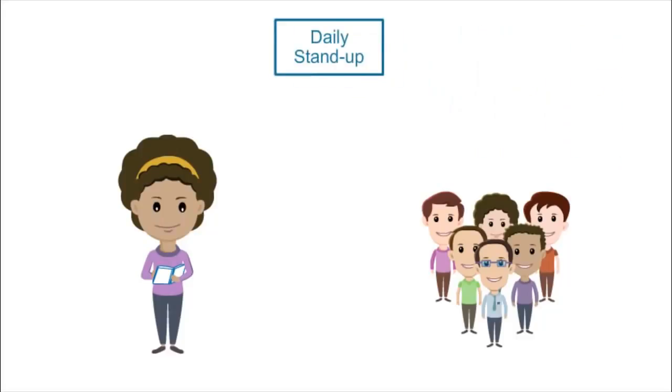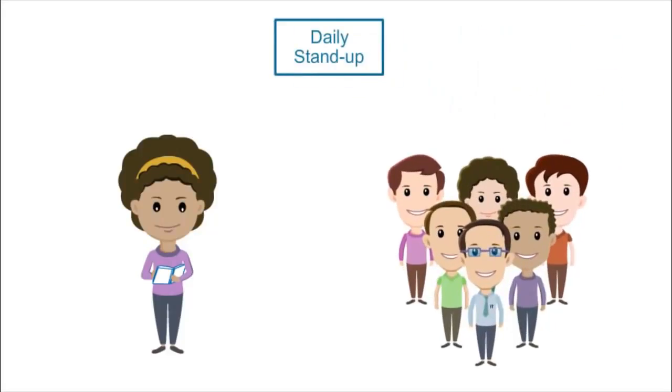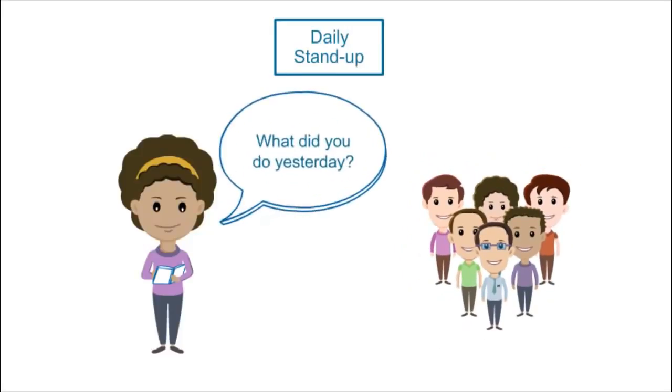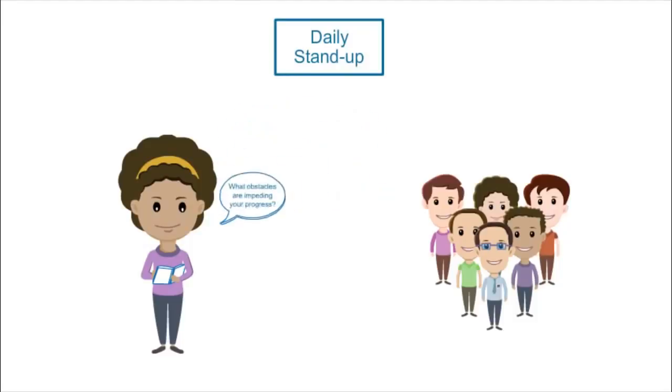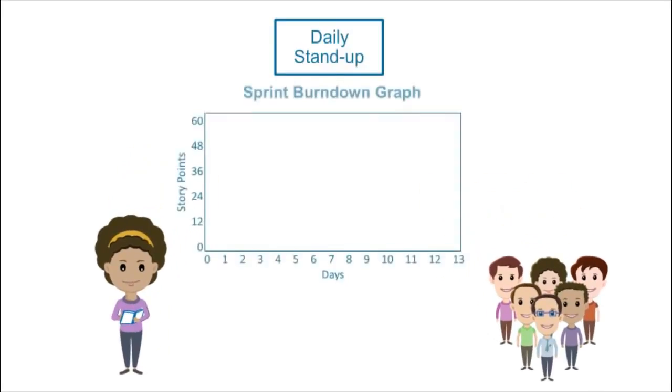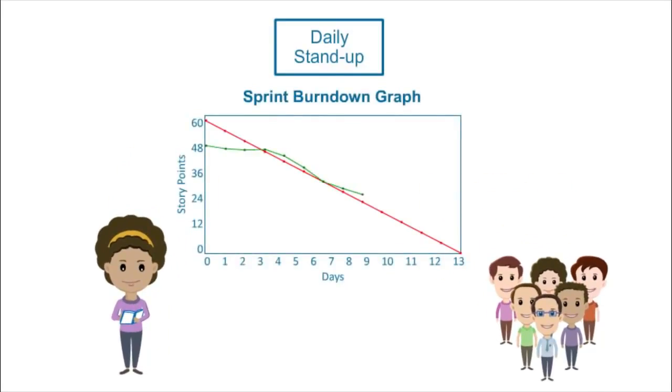When the sprint backlog is complete, the scrum team starts working on the user stories. Every day during the sprint, Tammy convenes the daily stand-up, a quick meeting where everyone answers three questions: What did you do yesterday? What will you do today? What obstacles are impeding your progress?